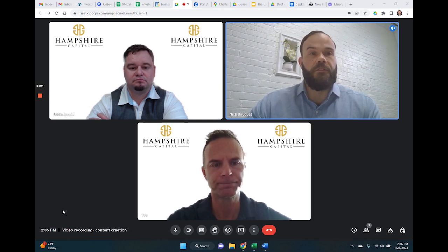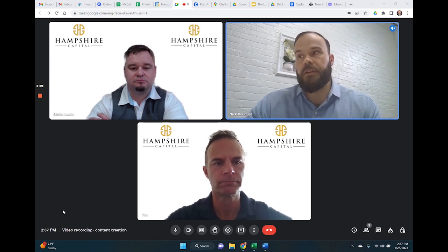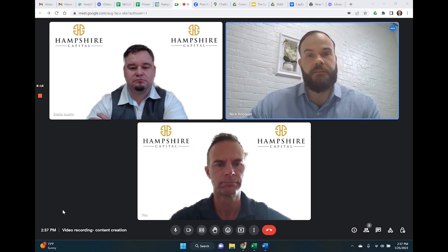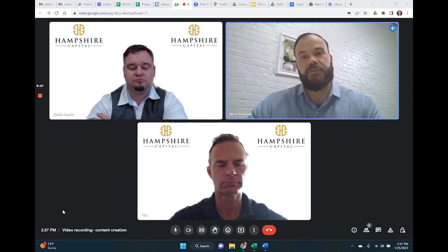Yep, that's right. The units, depending on the property size, typically take 18 to 24 months, at a clip of roughly 7 to 15 units a month, depending on contractor capacity, project size, and interior scope of work. And that interior scope typically takes 2 or 3 weeks to complete. We underwrite 2 months of downtime, so essentially a month for renovations and a month for releasing.